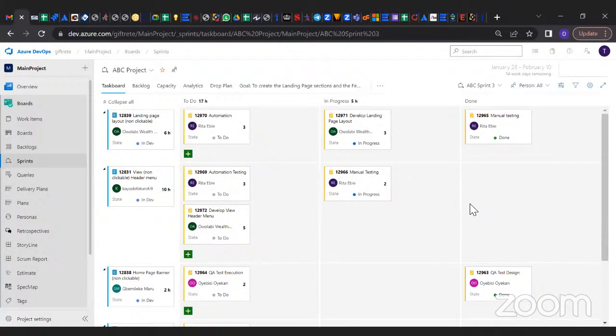So once that is done, then the next meeting is the sprint review. Before the sprint review, where we showcase what we've done during the sprint, we can quickly have a mini team review to check what has been completed to demo, what is not completed and why. This is a meeting that we just have within our team, without even the stakeholders there.